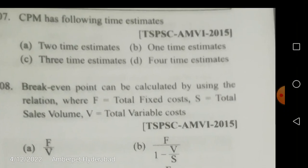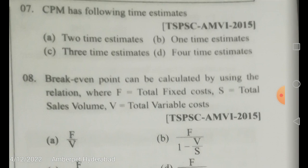Regarding time estimates: PERT has three time estimates, but CPM has only one time estimate.